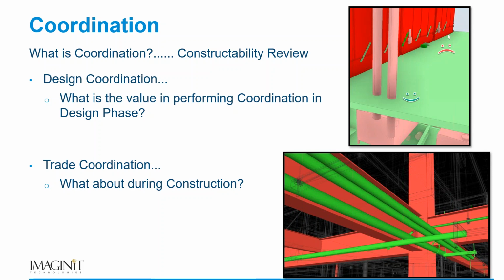No worries. But if you look to the north, we've got a piece of large equipment that's going to get a construction crane to lift it into place. But we've also got, say, roof drains that are encroaching on that piece of equipment. So that's going to cause a change. I'm going to have to move that. And as you will see in a moment, we want to catch these things as early as possible, because what is the impact of this? If I catch it earlier, it reduces the impact.